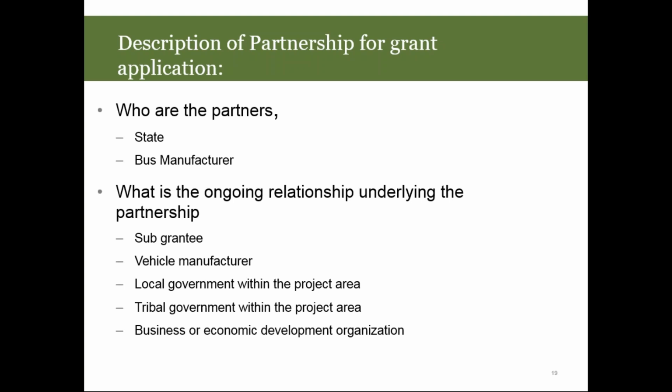As we were putting together our first project, we initially didn't necessarily have a lot of support from our power company, and then as we went into our second grant opportunity, suddenly the power company realized that everybody was switching to LEDs and they needed some power customers, and so they were suddenly on board, and we were able to receive enough money to cover half of the installation cost, or half of the cost for one of our charge stations that we put in for the grant.